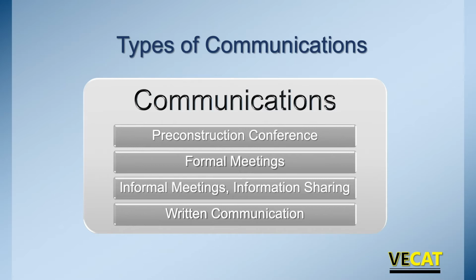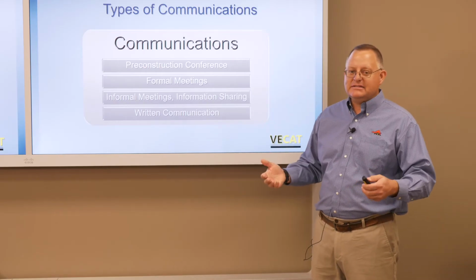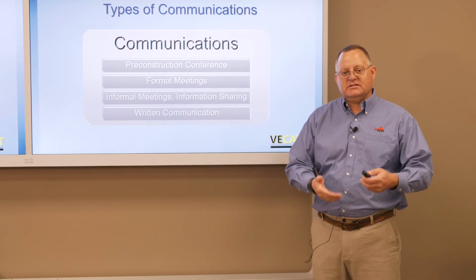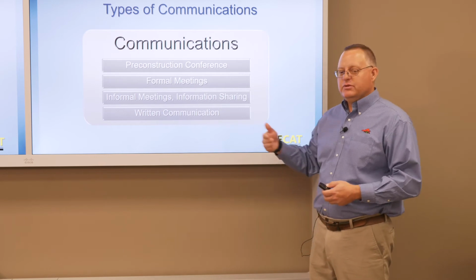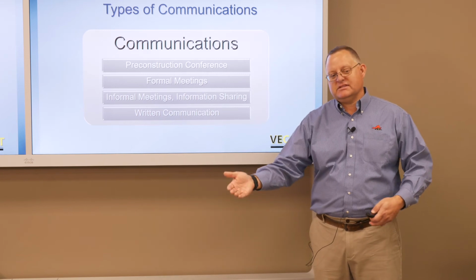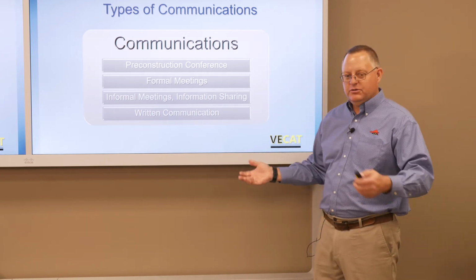We'll hold formal meetings. They may be required by contract, but a lot of times we'll do informal meetings and information sharing. You know, what type of results did you get? What are you doing here? A lot of communication constantly to make sure that project's successful. Very importantly, those written communications. So if something's decided or guidance is given or a request for information is made, we have written communication to document what was decided, so as we go forward, if something was to come up, we have something to fall back on and say, well, this is what was decided. Here was who was in the meeting. Here's who agreed to it, etc.